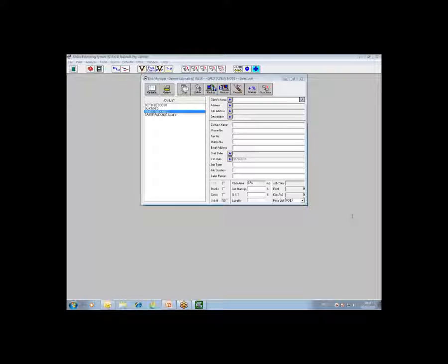If in the original bill you code up the items you want to go to the painting section, you can run the analysis. Of course, what you'll get is one trade called painting, and the remaining items in the original bill will be grouped in an uncoded section.